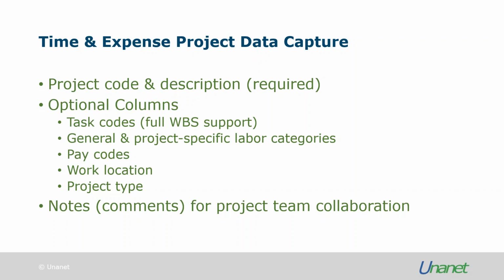You can have a task breakdown, for example, within a project. In fact, the work breakdown structure support in Unanet is extensive. It has a theoretical limit, but as a practical matter, no one will exceed the work breakdown structure limitations of Unanet. I personally tested the capabilities the other day, and I simply gave up when I got down to 16 levels in the work breakdown structure. I concluded that no one should go to 16 levels in a work breakdown structure in the first place. It'll probably go further than that, but that's where I stopped.